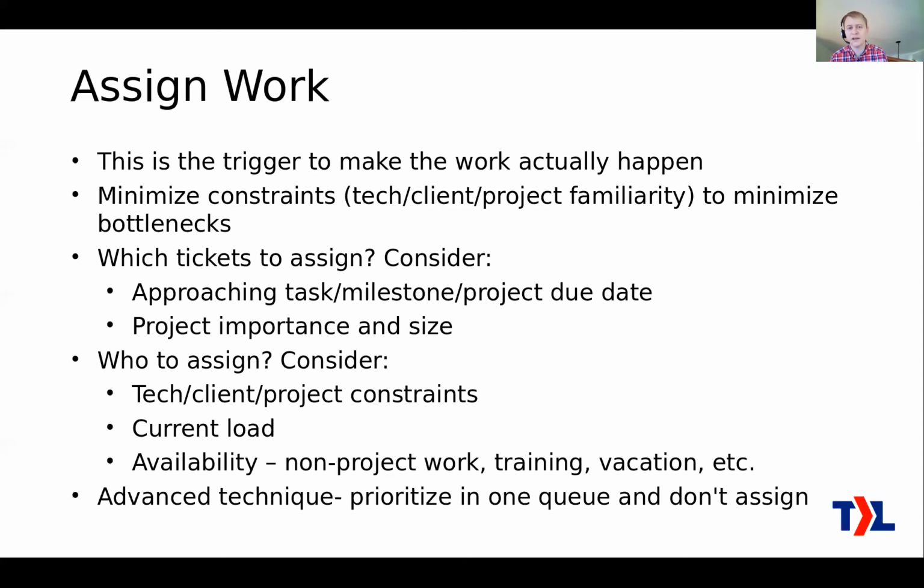Now, let me mention kind of an advanced technique, which is you don't actually do all of this step. You don't actually assign it to a particular engineer. This technique is to just make one queue of work. You just kind of pop it in. You prioritize it as the project manager, so you put it in what order you want this work to be done, but you don't actually assign it. And you can do this if you don't have too many constraints in your team.